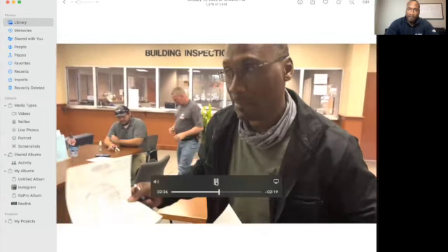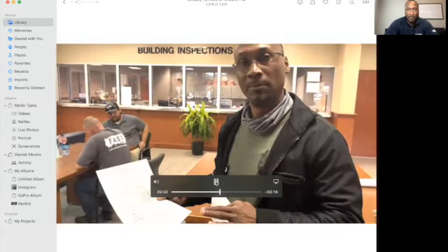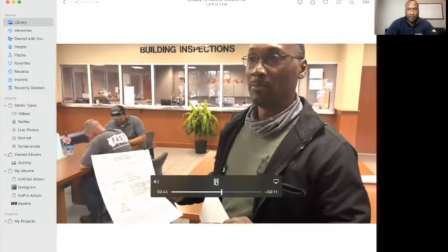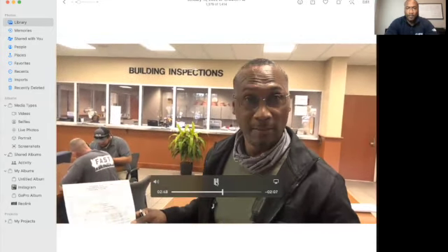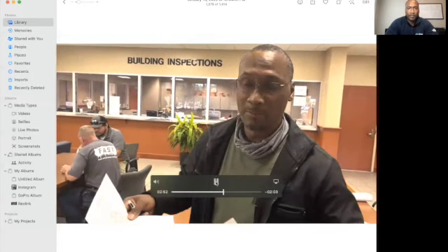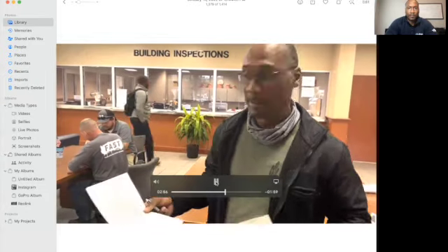You don't want to have to come back and do something else, because now they've got to call and you've got to come back up here. So just go ahead and turn everything in all at one time. That way, when the plans examiner does what he has to do, he has everything he needs, and then he can send you for the permit. Once he gets done with it, you can come down and pay for the permit and pick your permit up.